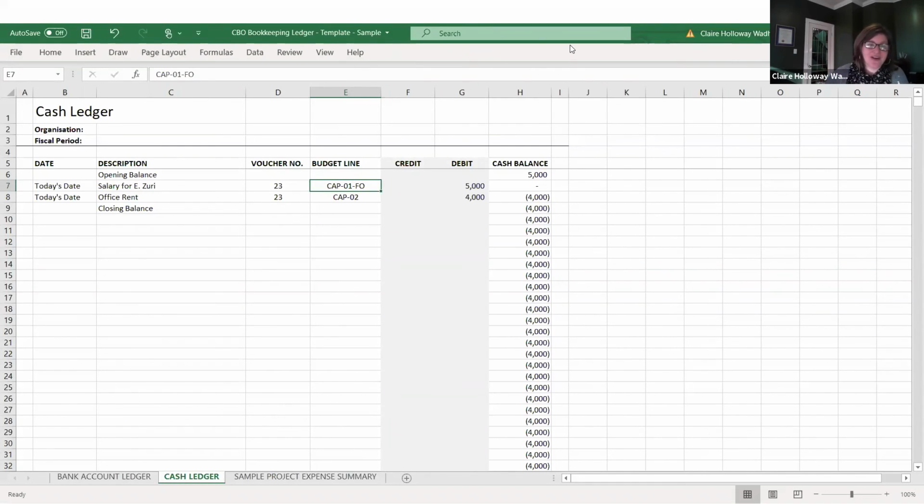So if you've spent more on training, you need to spend less somewhere else, unfortunately. So it's really good to be doing this on a monthly basis, right? That way, even if you do overspend slightly, you're going to see it right away, and it's not going to cause major problems down the road.